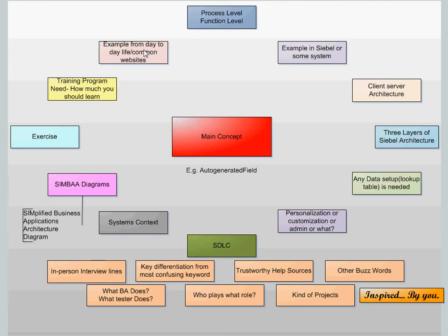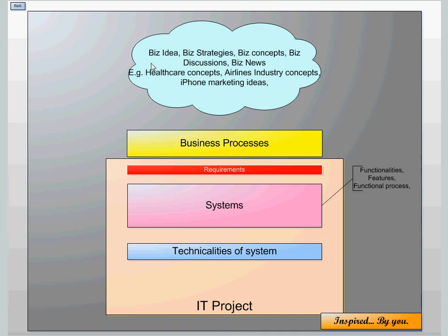So that is what I gave you a few minutes ago. You don't have to worry about it. None of these things are important, but from the business function context, every time they would be identifying the benefits, when you gather the requirements, you will give them the cost. This is how much it will cost to implement a system for those requirements. When you give the cost, you don't give a dollar amount, you give a total number of man hours as the cost.